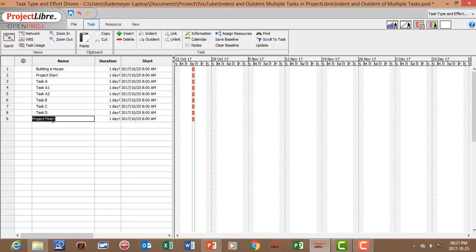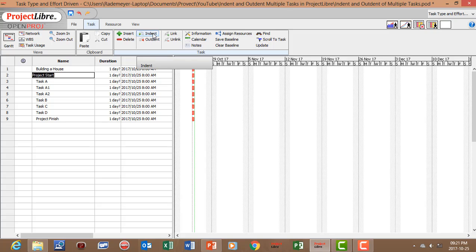So if we want to indent one task we can just click on that task and say indent.